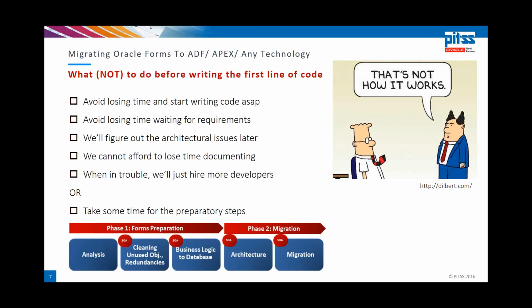What we want is to eliminate the objects that are not used and also duplicates, code duplicates especially. This way the team will not migrate the same routine 20 times, but will correctly identify a duplicated routine as a shared resource and migrate it in a shared library, for instance. So let's start with the first and most important of the preparatory steps, the analysis.